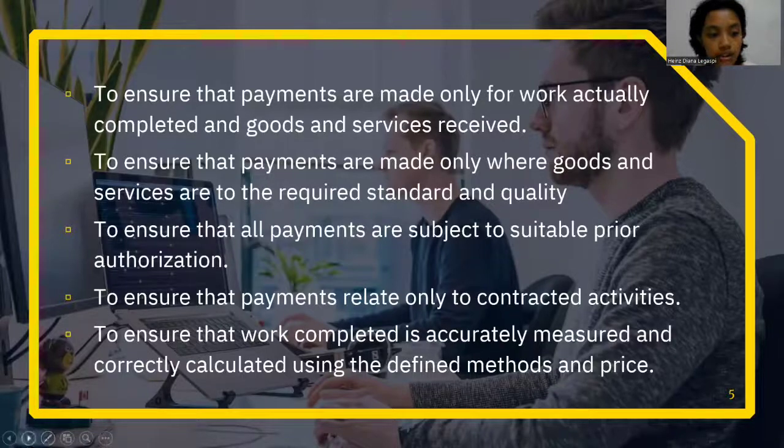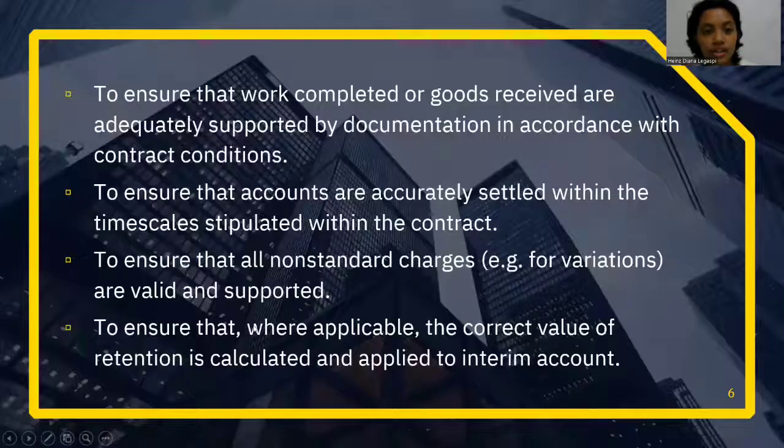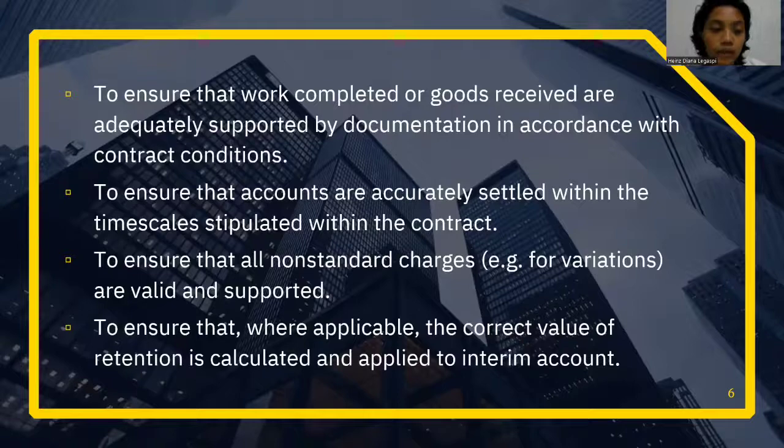So the next one is to ensure that work completed or goods received are adequately supported by documentation in accordance with contracted conditions. So this is to verify whether the goods or services you received are supported by the contract, or if you receive the goods or service, of course, in line with the terms of the contract.